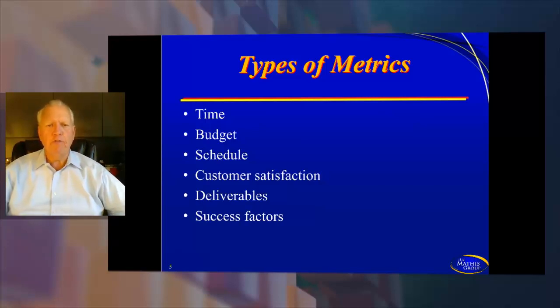So for example, if you've got an internal best practice of how you do project management, and you want that vendor to interact with that process, because I hear this from time to time, and that vendor's not doing it, make sure that was part of the contract, that the vendor had to comply with the best practices of your organization rather than you complying to the vendor, if that was a big deal. Now, I'm not saying it's a big deal. It might not be. But if the vendor's doing a lot of the work on site and interacting with a lot of your people, your best practice might be better than the vendor's best practice.